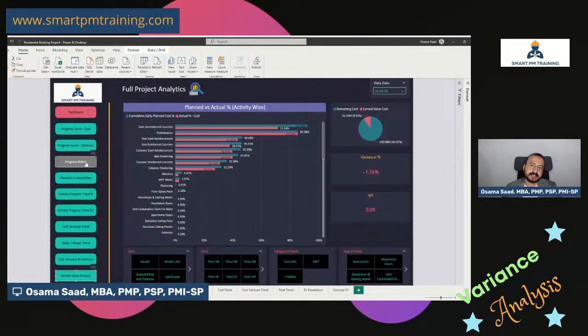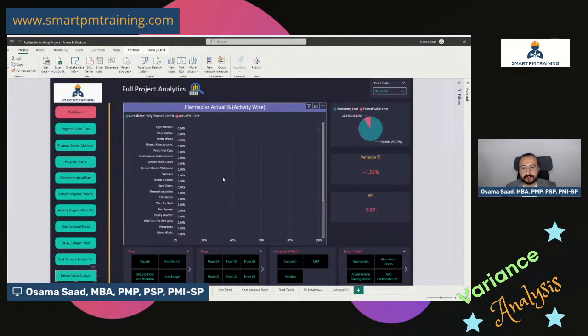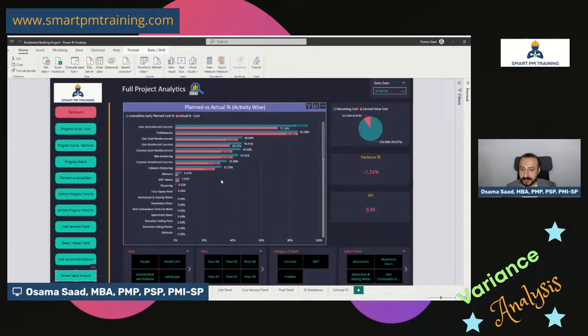For progress metrics, it's more like a quantitative assessment. I can see the list of activities for the whole project, summarized, because typically you have thousands of activities in the project. It is not a good practice to report the progress of several thousand. Nobody has enough time or energy to do so, and you cannot have meaningful analysis.